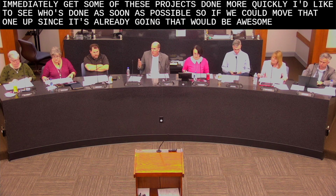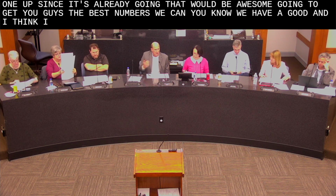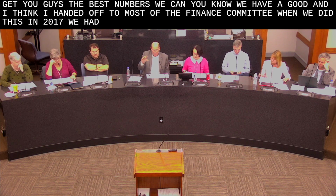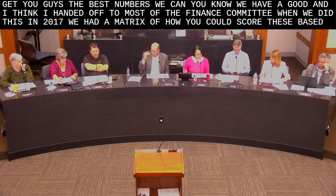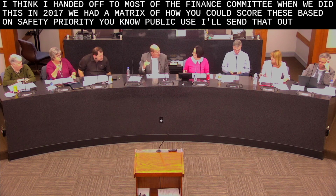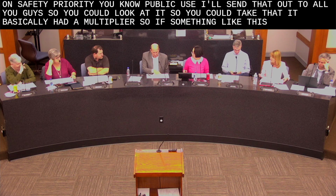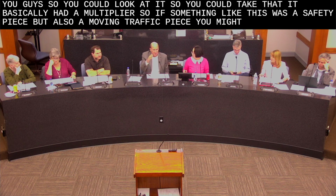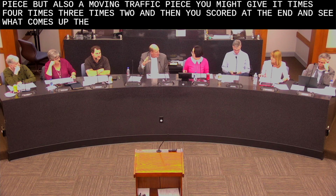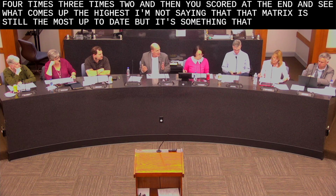Yeah. So I think, going back, we're trying to get you guys the best numbers we can. I think I handed it off to most of the finance committee. When we did this in 2017, we had a matrix of how you could score these based on safety, priority, public use. I'll send that out to all you guys so you can look at it. It basically had a multiplier. So if something was a safety piece but also a moving traffic piece, you might give it times 4, times 3, times 2, and then you score it at the end and see what comes up the highest. I'm not saying that matrix is still the most up to date, but it's a great starting point.